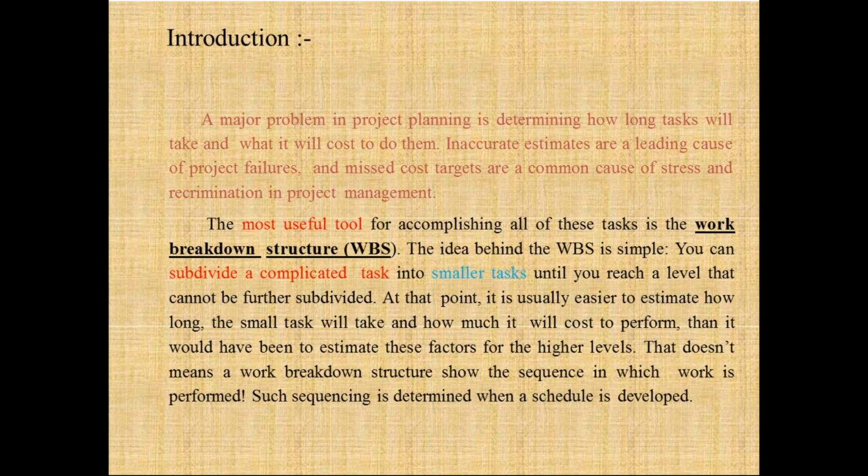That doesn't mean that a work breakdown structure shows the sequence in which the work is performed. Such sequencing is determined when a schedule is being developed, according to the various logical sequences.